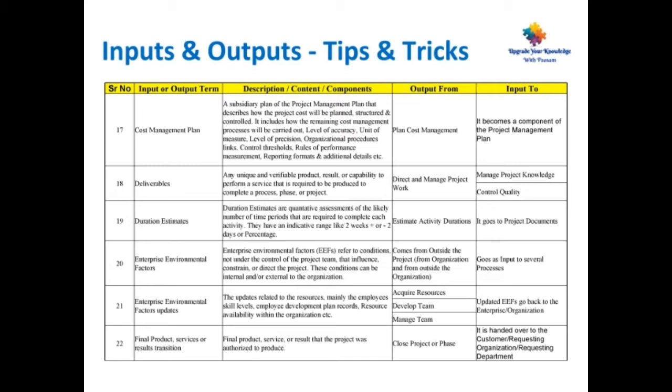Point number 18, deliverables. Any unique and verifiable product, result or capability to perform a service that is required to be produced to complete a process, phase or project. It is the output from direct and manage project work, input to manage project knowledge and control quality.